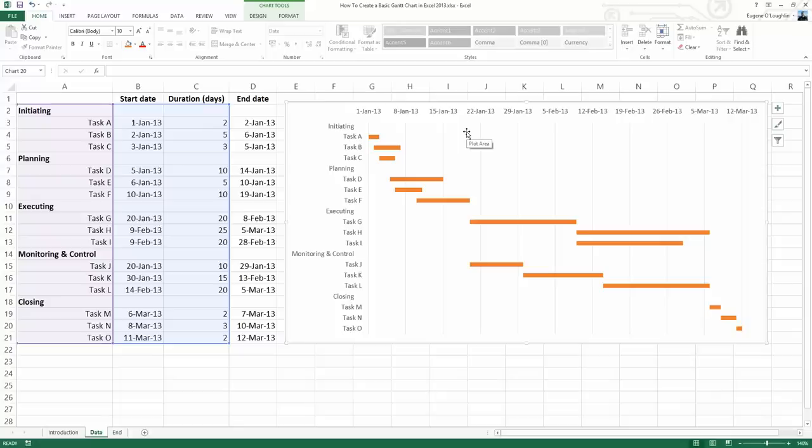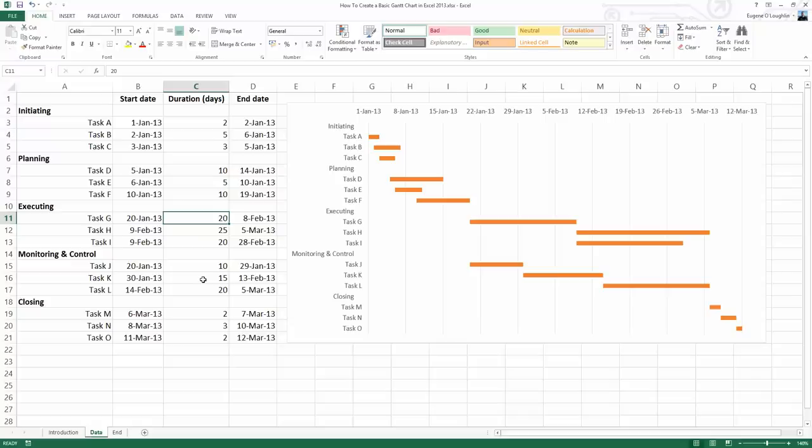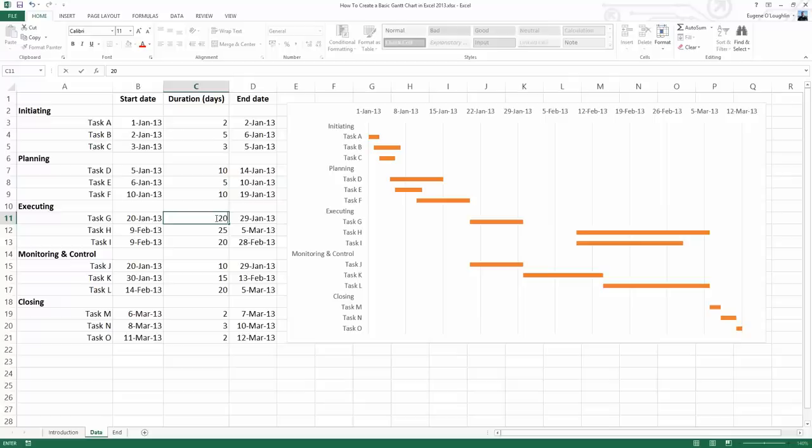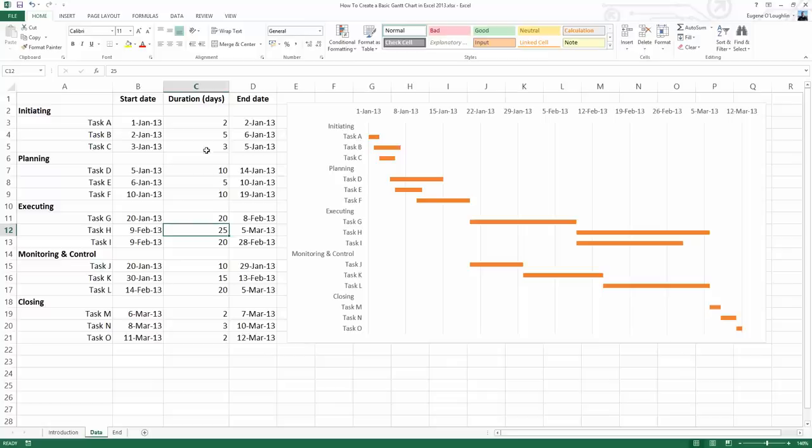The last thing I'm going to do is show you one final thing. Let's take a look at Task G in the center of our chart. We can see it has a duration of 20 days. Let's say I needed to change that down to 10 days, so type in 10 days. We can see that our bar on our Gantt chart is made smaller to represent the 10 days duration. If I change it back to 20 days, we can see the bar is returned to its longer version. We can actually make changes to the start dates and the durations and the end dates, and they will be reflected dynamically on my Gantt chart.